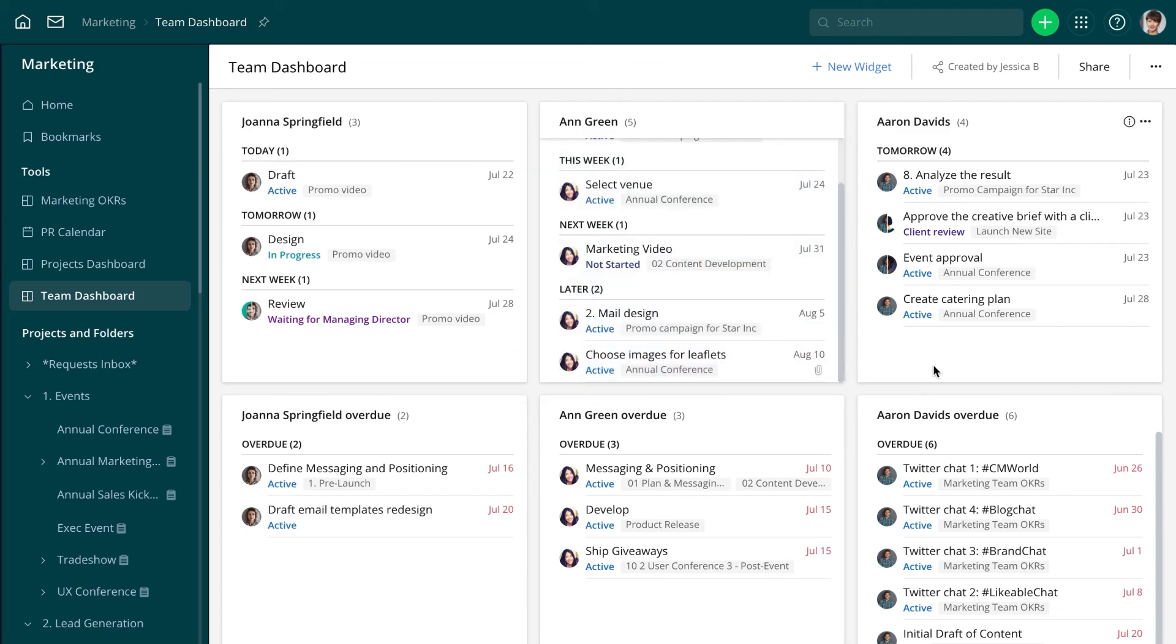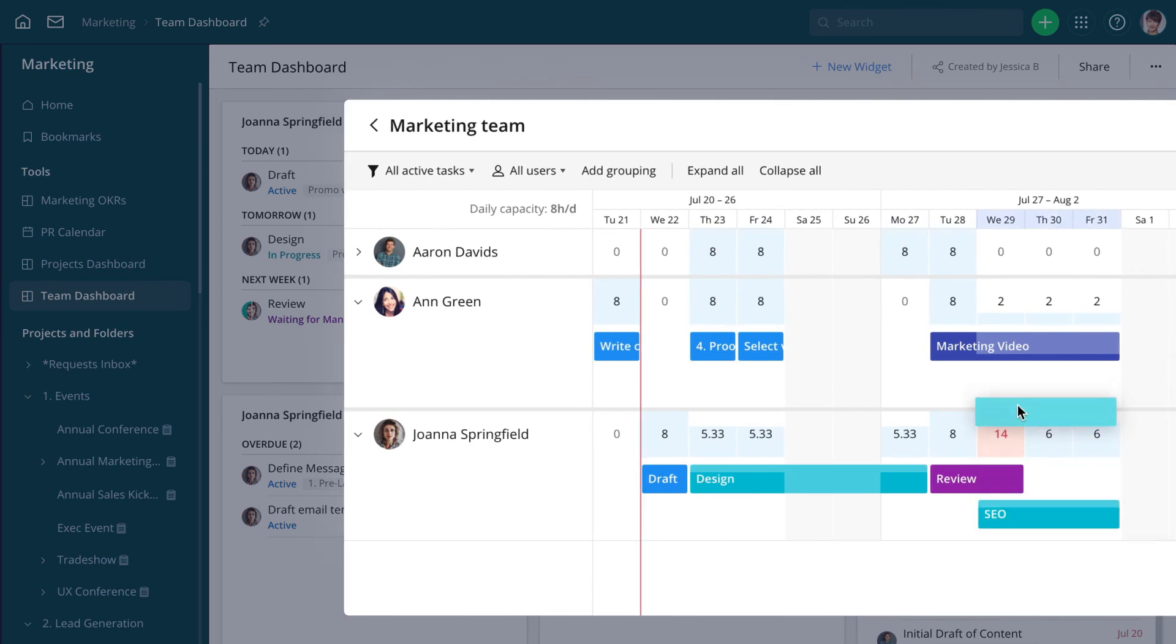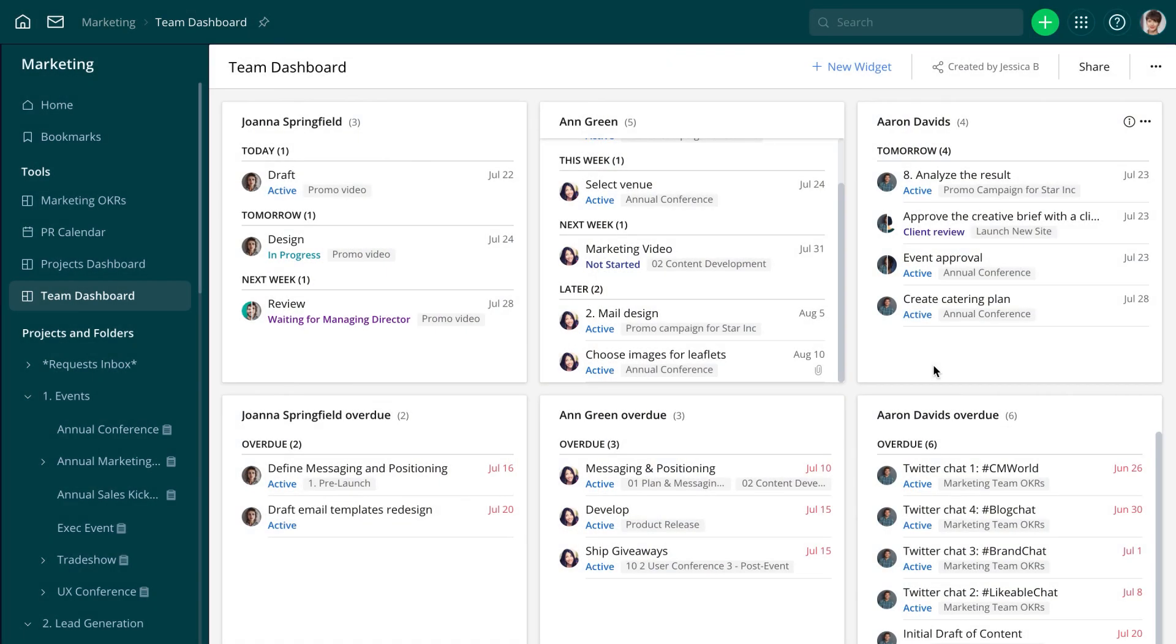If you have the Wrike resource add-on, you can manage such cases on the workload chart. With all the task details available on the team tasks dashboard, Jessica can see how each team member is progressing with the tasks assigned and analyze how this will affect the overall project progress.